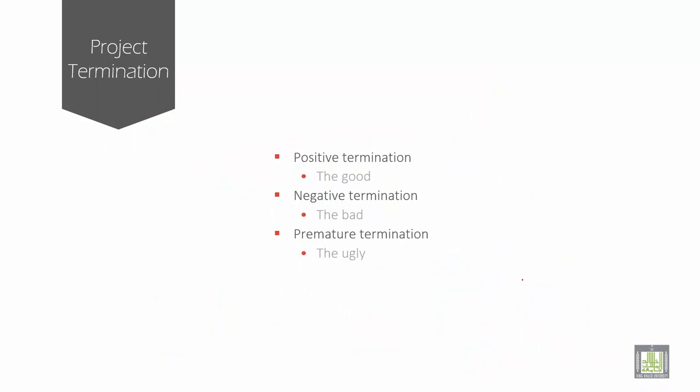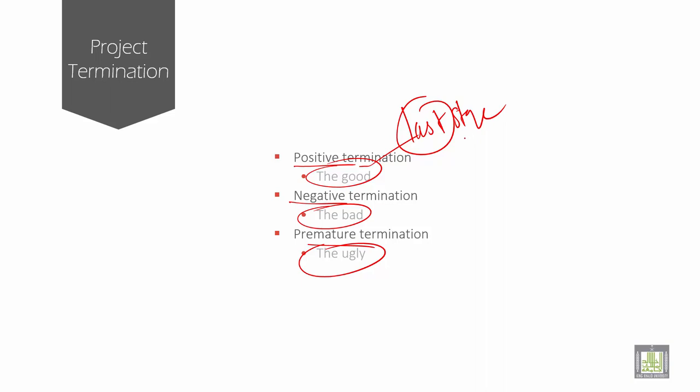Then project termination. There are three types: positive, negative, and premature. Positive termination is the last stage of managing the project, occurring after the implementation phase has ended. A review is undertaken with the client and other project stakeholders, during which the project outcomes are evaluated against the project's stated aims and objectives.